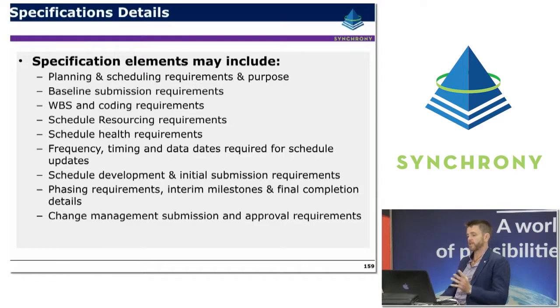It's also important to look at schedule resourcing requirements, schedule health requirements, and this is a key one. So including schedule health requirements just to help provide assurance that the technical schedule aspects, or the linking and the logic that's been baked into the schedule, is robust. Frequency and timing of data dates and submissions of updates is a really critical one.